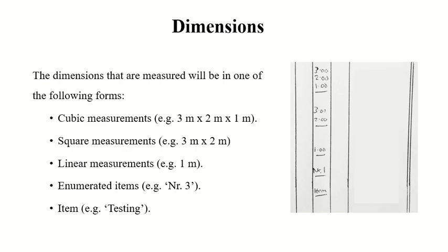Soil testing, right? Testing is an item. It will have a cost, but it's like how many times you are doing it. So this is like one item. These are the items where you tell the contractor, okay, I will give you this much for this whole thing.